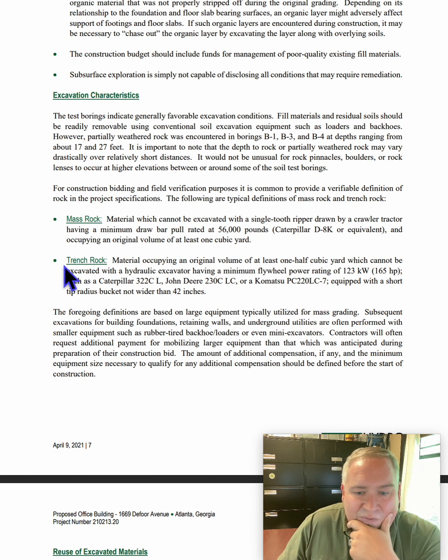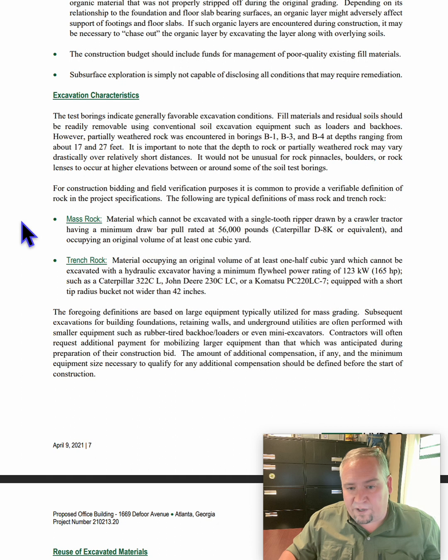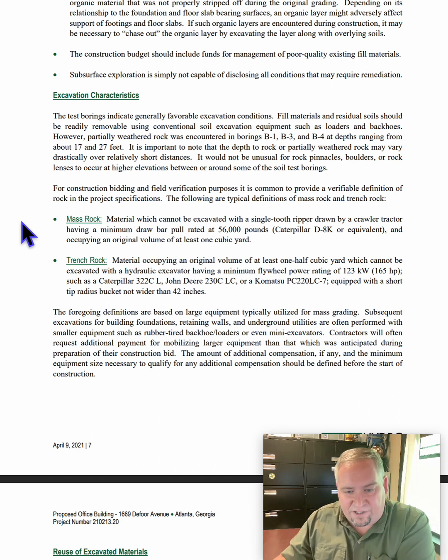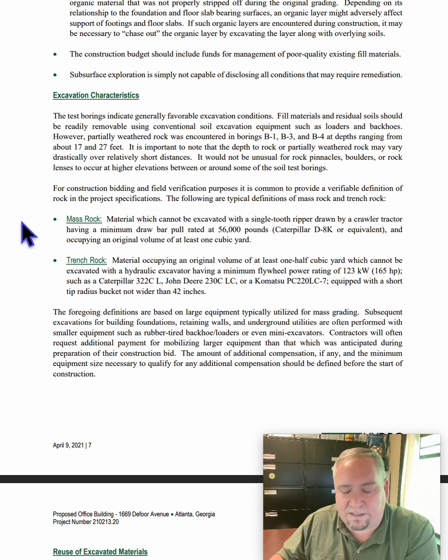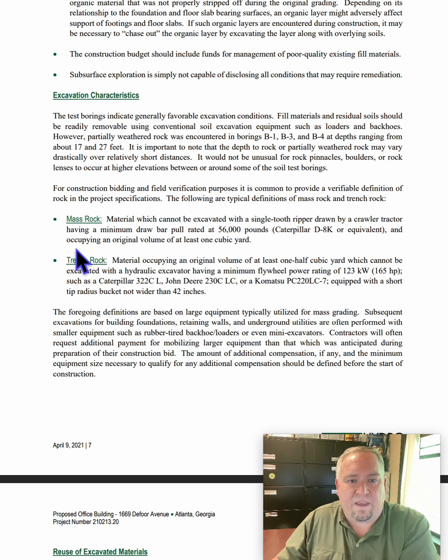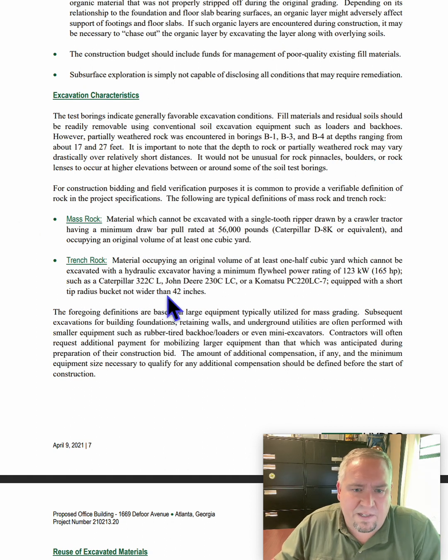And we can all qualify it, and we've got a price associated with this, and we have a price associated with this. All this stuff should be agreed upon on the front end, not as you're trying to negotiate in the middle of finding the rock. So it keeps the crew rolling, and we need to do this as preventative and not in a reactive state. So get everybody on the same page.